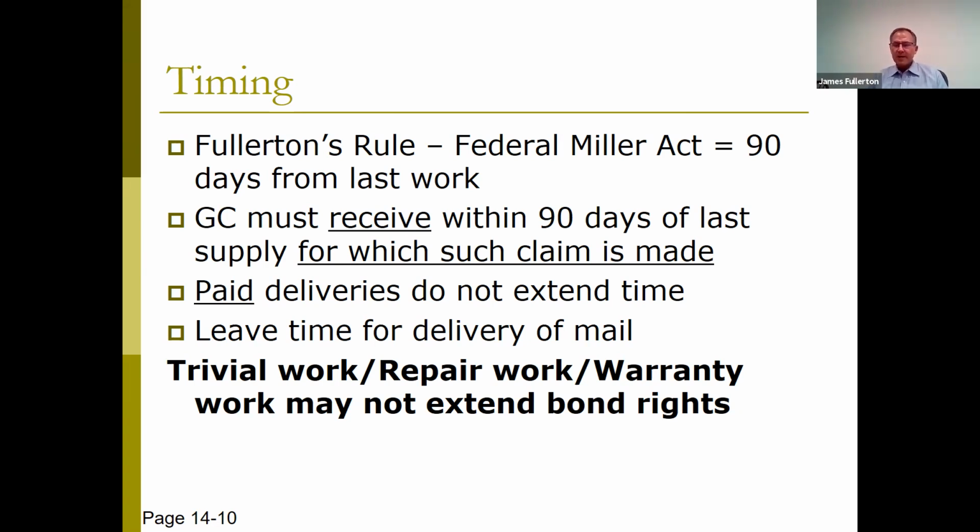You can help a customer who might just have cash flow problems because of a few nasty owners or GCs that are slow in payment to them. You can help them out, preserve a relationship, and you're not risking any more money by increasing the unsecured debt that you have. So it may make sense to do that, but I want you to realize that those COD deliveries do not extend your time to make a bond claim.